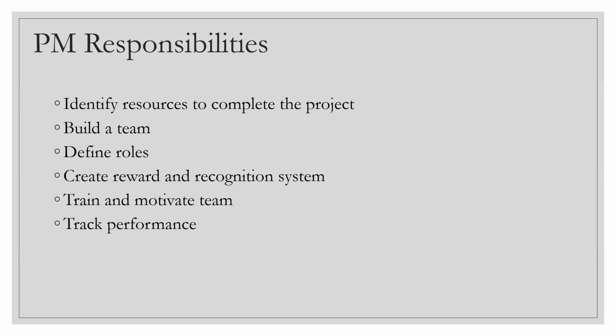The performance key metrics or the key parameters have to be defined by the project manager, and then the metrics have to be tracked and also be shared with the key stakeholders. That tells you about the health of the project basically. What we said in the past, like our CPI, SPI, are they above one? If they're above one, excellent. If they're one, then also it's pretty good, right? But if it's below one, then there is a concern. Then you have to take some corrective action to ensure that they are getting back on track.